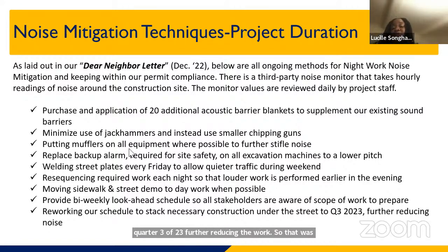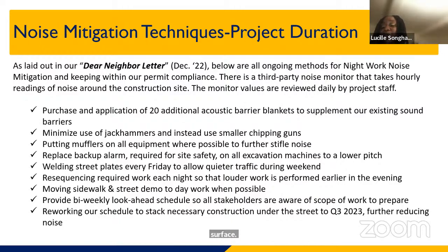Once we are able to start working further down below, there will be less noise that folks hear on the surface. And so we're really looking to stack whatever construction might be loudest to that period once we are fully and completely under the street. But again, we still have a lot of work to do to get to that point. But we are really feeling very committed to keeping these noise mitigation techniques ongoing.